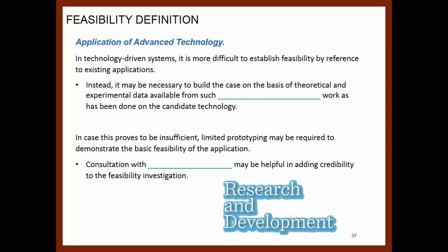Application of advanced technology in a technology-driven system is more difficult to establish feasibility by reference to existing applications. Instead, it may be necessary to build a case on the basis of theoretical or experimental data available from research and development work that has been done on the candidate technology. In case this proves to be insufficient, limited prototyping may be required to demonstrate the basic feasibility of the application. Consultation with outside experts may be helpful in adding credibility to the feasibility investigations. So,